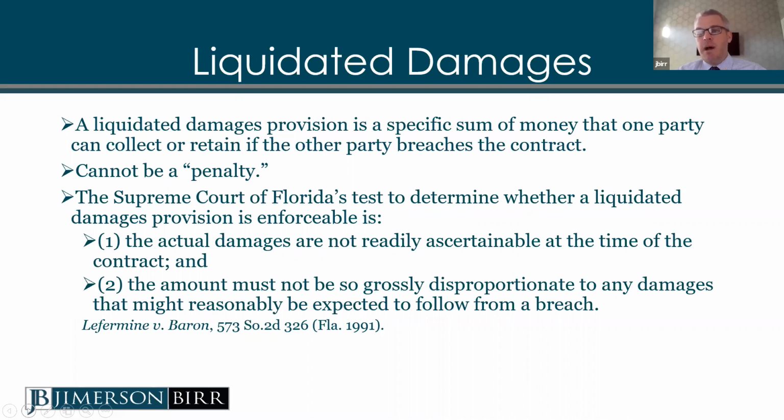So just keep in mind, you can't just arbitrarily assign some number to a liquidated damages provision, because courts will scrutinize that. Hopefully, if you're putting together a liquidated damages provision that you're trying to enforce against another party, there needs to be some thought process behind it to try to meet the objectives that the Supreme Court says you need to follow in determining whether that provision is enforceable.